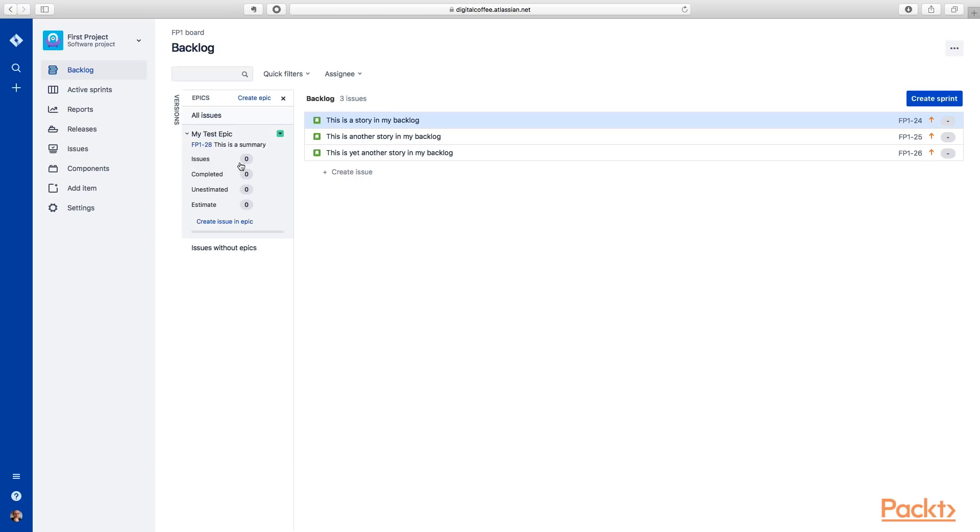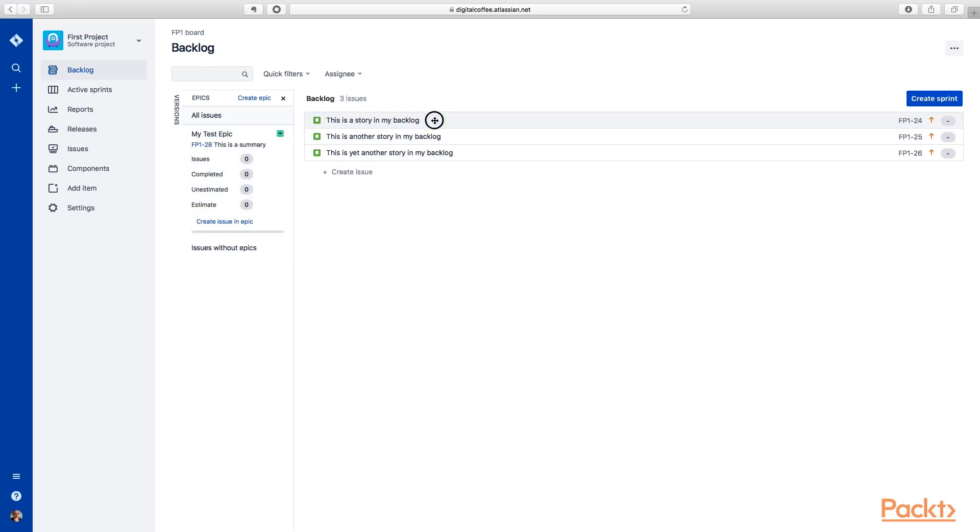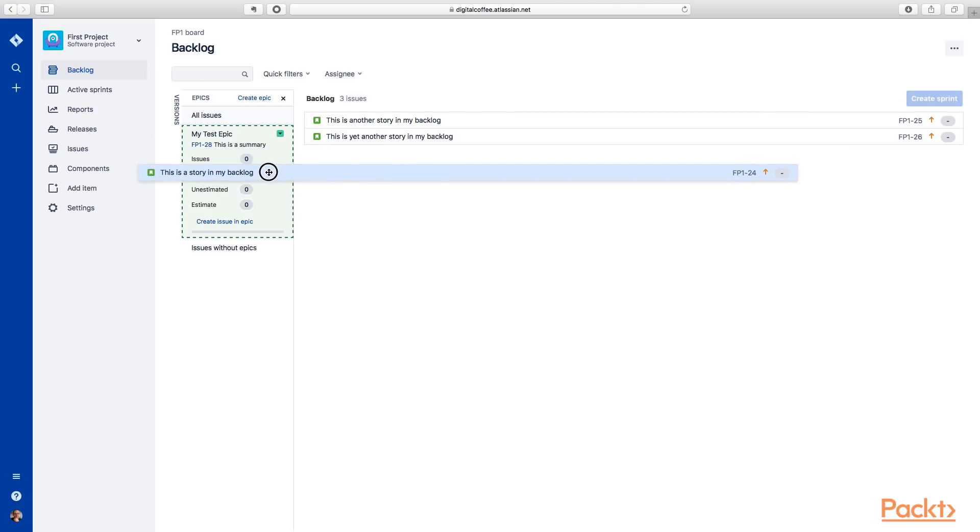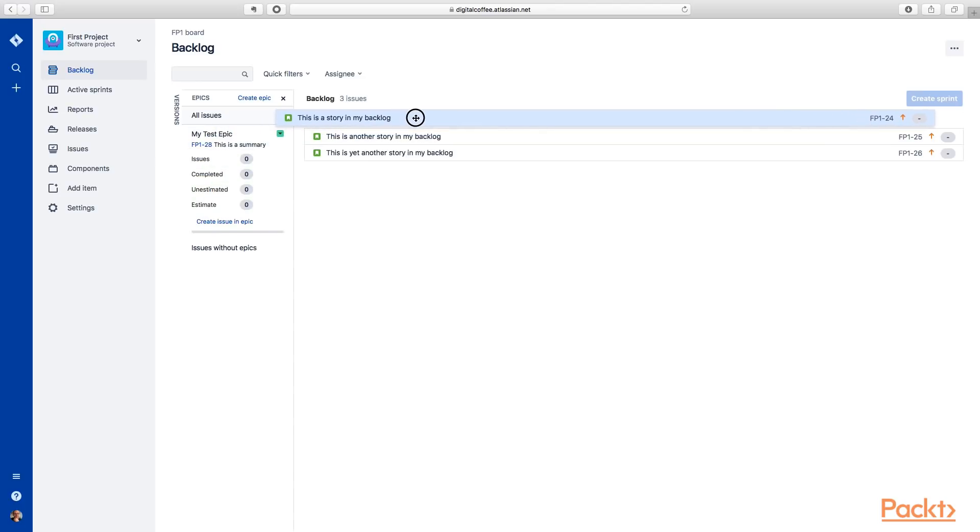You can see here how many are completed, unestimated, and how many are estimated. And this is a status bar on the bottom here. So what you would do is create your backlog items, and then you would drag those into your epic. And that's how you assign them to that epic.